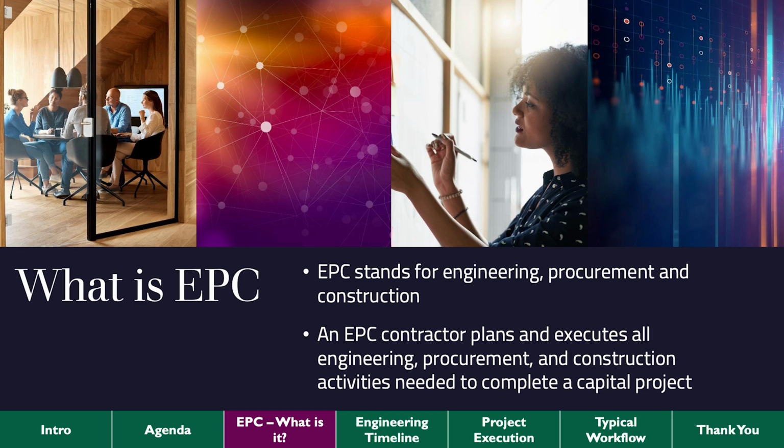But before we move to that part, in addition to delivering a complete facility, the contractor must be delivering, adding to what you're mentioning, that facility for a guaranteed price by a fixed date, and it must perform to a specified level. Got it.